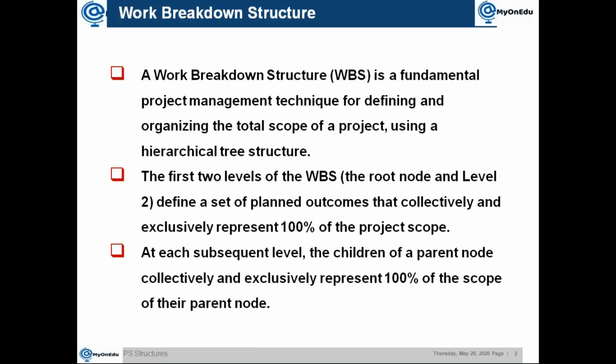Then when it comes to a project, for example, you need to implement, say, 5 modules. So you can break down the total scope. For example, it has an overall project. Then at level 2, you will break down based on the phases: the preparation phase, then the blueprint phase, then realization, final preparation, then go live. So that is level 2.